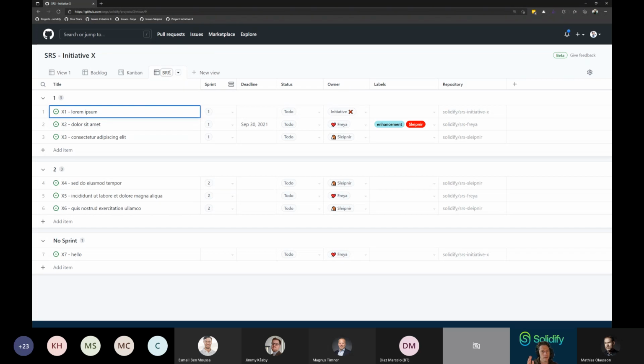for the upcoming sprints. I've grouped this board based on the value of the sprint column. So here we have sprint 1, sprint 2, and then we'll have 3, 4, 5, etc. And the items that still have not been put into a sprint or planned for a sprint are grouped together in the no sprint area at the bottom. And this is where we're getting closer to this program board visualization, because you remember I said let's do it with a twist, and basically what I've done here is I've turned that board 90 degrees.